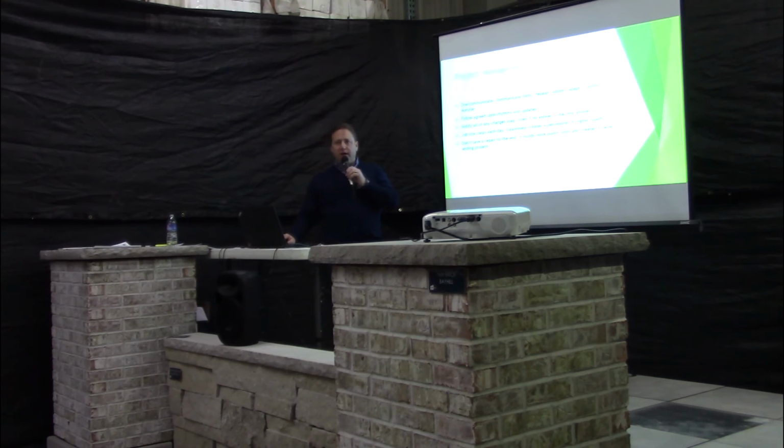Don't save a repair for the end. I'll share an experience I have in the design build business. A lot of cabinet installers will adjust their cabinet doors when they come back and do final trim on the project, when they come back and hang the doorknobs and everything. But they'll leave the cabinets out of whack. They won't adjust the doors and get them all nice and level and flush looking with each other. And they say, we'll do it when we come back.